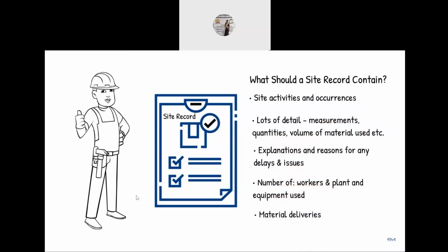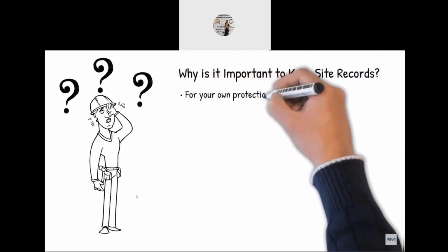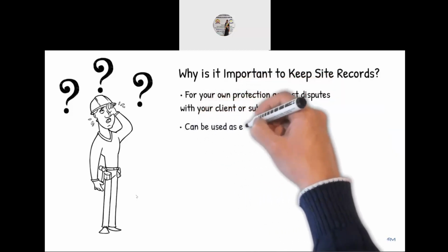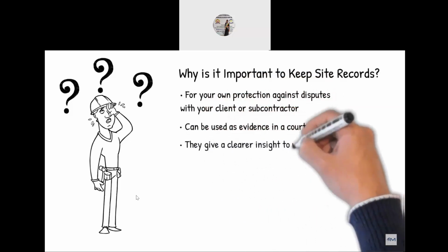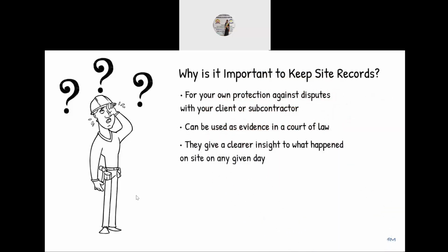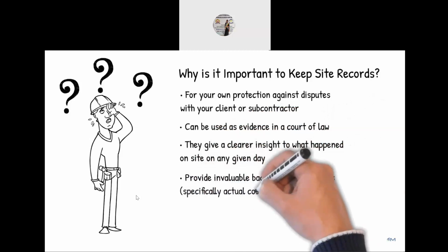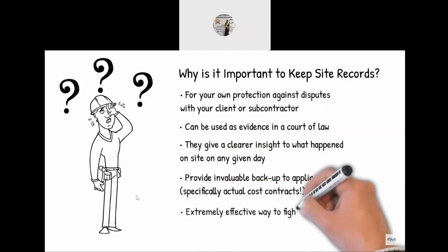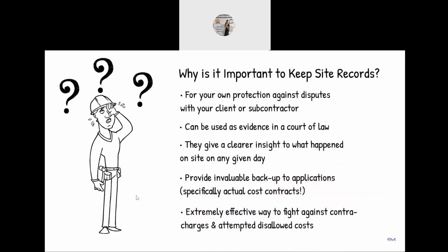Keeping detailed site records is important for the following reasons. They can be used for your own protection in disputes with your customers or subcontractors. Site records can be used as evidence of site activities in a court of law. Record keeping in construction projects helps you get a clearer insight into what happened on site. Perhaps most importantly, they are invaluable in providing backup to applications, particularly for actual cost contracts, and are one of the most effective ways to fight against an attempted contra-charge and to also combat potential disallowed costs by clients.